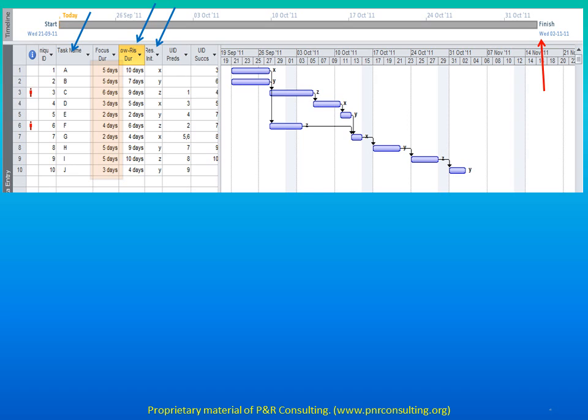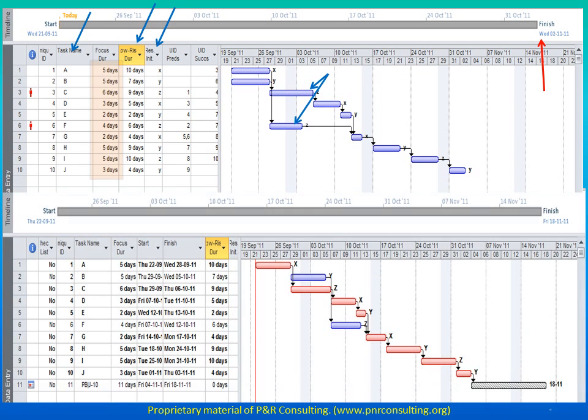This schedule is not complete, since there is an issue with resource allocation. The CCPM add-on software, which can be used along with Microsoft Project, has features to remove this contention in resource allocation and develop the new schedule. The final schedule is ready and it looks like this. Here, one can notice that the project completion date gets shifted to 18th November 2011.